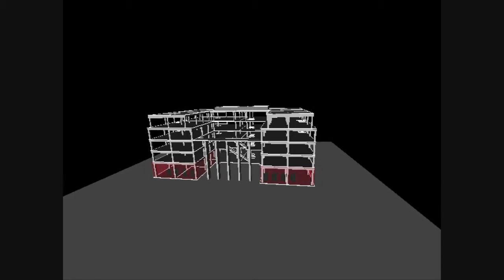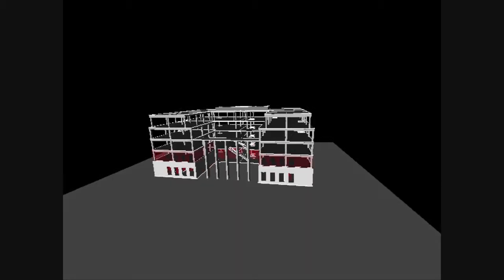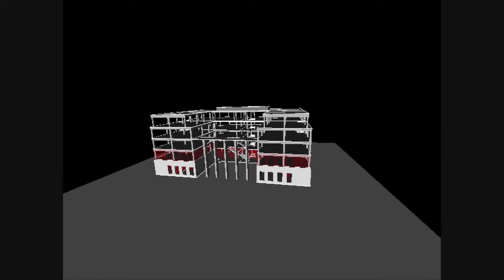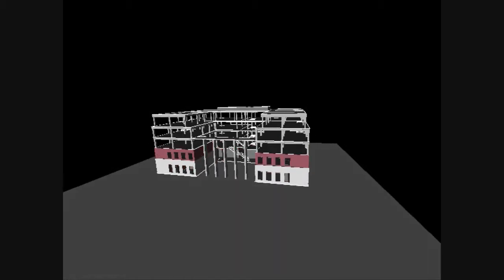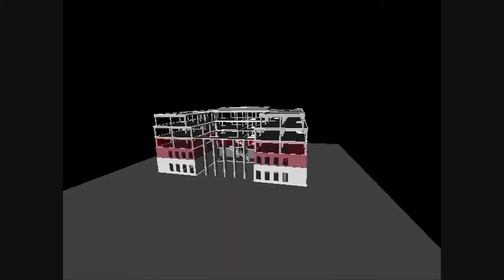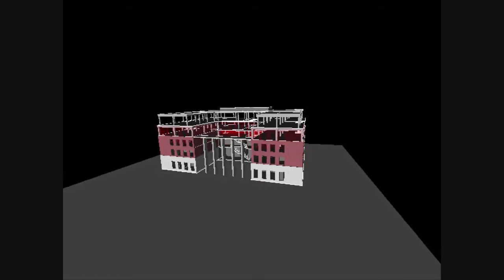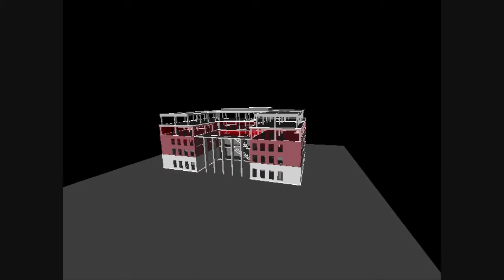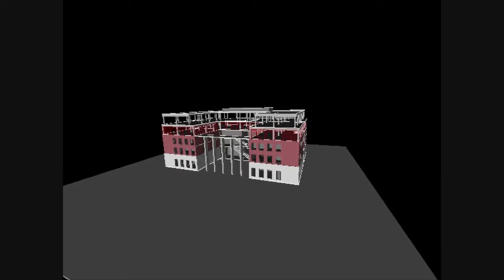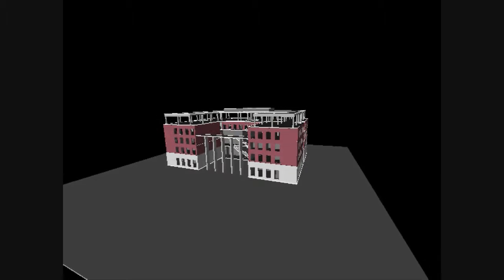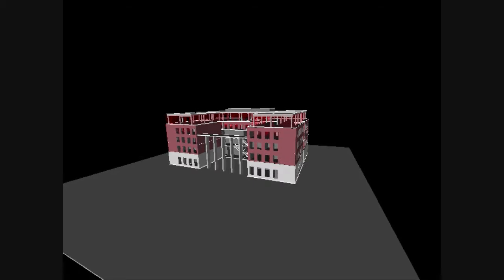Installation of the mechanical, electrical, and plumbing systems will begin on a floor-by-floor basis, beginning with the crawl space and first floor. As the first floor MEP is being completed, the exterior partitions will begin. The walls will be framed and bricked in the same manner. Two crews will be used, starting at opposite corners of the building and rotate around to the other's beginning point.